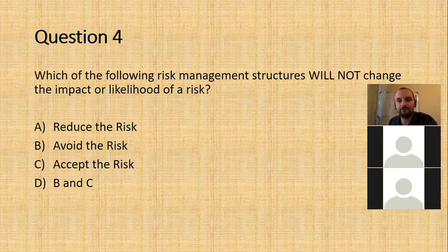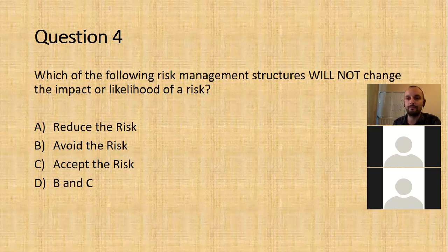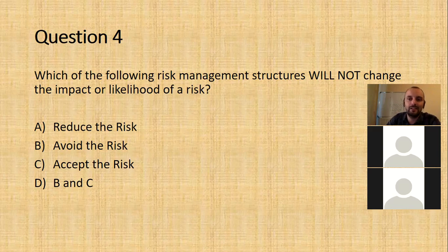But yeah, basically a risk is made up of 2 sections: its cost or impact and its likelihood. So let's say I'm drinking tea. There is a risk to me that I could burn my tongue. Now, the impact of that will probably be, let's say, $100. I'm going to have to go to the doctor, pay for a doctor's visit and get medicine, $100. That's the impact. The likelihood of it happening, though, is pretty small, because I drink tea all the time. I'm pretty careful. The likelihood might be 1%. So the impact is $100. Likelihood is 1%. Does that make sense?